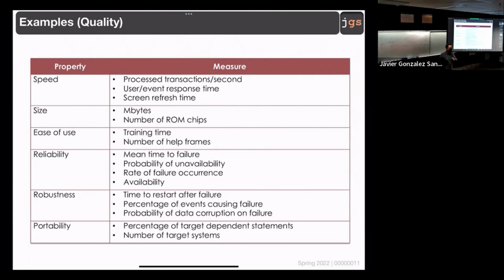Let's change the sentence. The system should load in less than some seconds, or for any event that the user creates, the response should be there in this particular amount of time, or the screen refresh should be as fast as 30 frames per second or 60 frames per second. Put a number. It's talking about speed. It's going to be non-functional, but you need to review the INVEST. You need to put the numbers for the testing, the estimation, and also negotiable. You need to avoid the confusion. Clear?